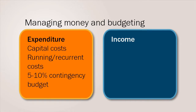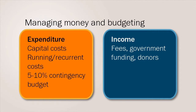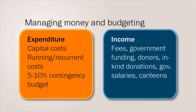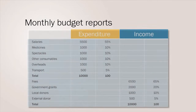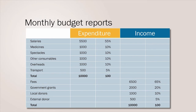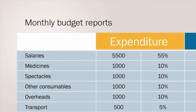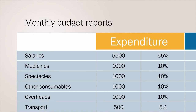Budgets should list all of a program's sources of income. These include fees, funding from government, local and international donors, in-kind donations, government salaries, income generated from canteens, spectacle sales, and so on. An itemized budget layout for each activity is established in order to be able to update or vary estimates and quantities. Information on both expenditure and income is part of a monthly report that should be produced for management. The percentage of each line item that has been spent or collected is calculated; items worth ten percent or more are especially important.